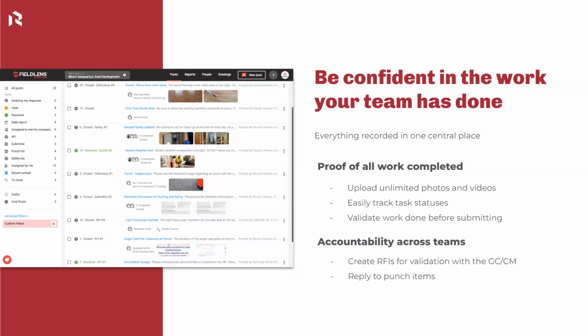And when things change, whether it's a submittal, an RFI, or some value engineering initiatives, having all that documented, that paper trail of what is the latest and greatest, what was the final direction, is really important. That gives you the confidence to know, hey, this is the correct work. I shouldn't be charged or asked to do anything again. This was the final direction.